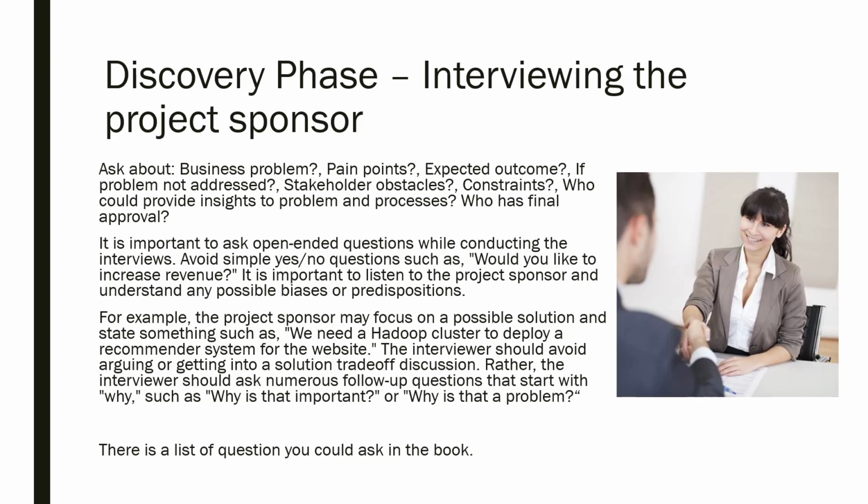And then finding these issues from the stakeholders at this point could be crucial for the whole thing. It's really, really important that you get this stage right. So for example, the project sponsor may focus on a possible solution. They could state something such as, we need a Hadoop cluster to develop blah, blah, blah. The interviewer should avoid arguing or getting into solution trade-off discussions. Rather, they should say, why? Tell me why. Why is that important?